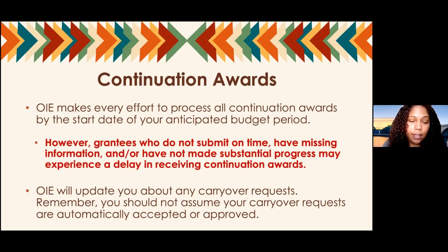If you have a large balance in G5 and we determine that you needed a reduction, we do not take the funds out of G5. Everything still stays in there. What we will do is take funds from future payments. So that will be your new award funding. So, if you are unable to spend about $100,000 this year because of personnel and you have no revision or request to change that, your new award will be reduced by $100,000. So that's kind of how you can tell if you received a reduction or if your carryover is included in your award.